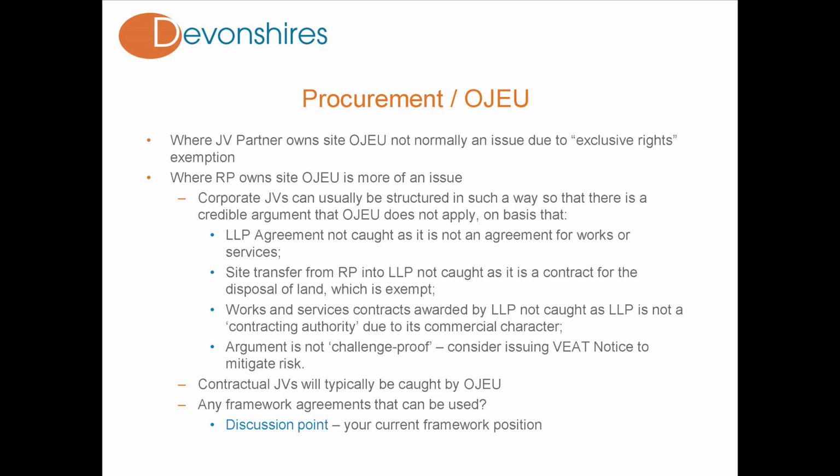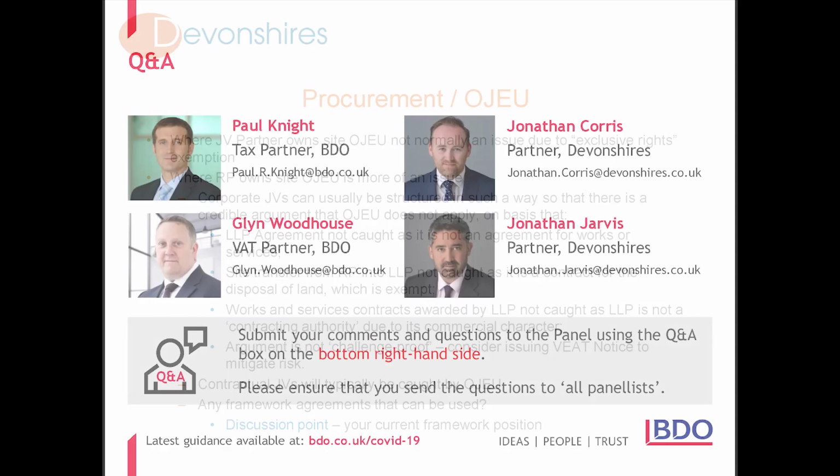While this can sound a daunting exercise to do, typically actually we can see frameworks created in a period of 3 to 4 months. And at the moment now, we're finding that clients have the staff necessary to focus on actually providing the documentation and requirements needed to be able to bring forward a framework as swiftly as possible. That's the end of our comments on these points for now. So we'll pass back to BDO and look forward to questions at the end.